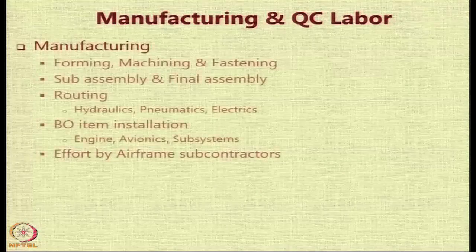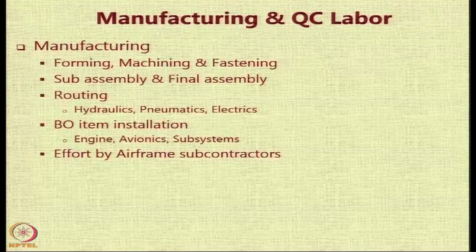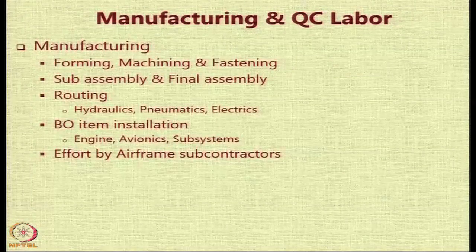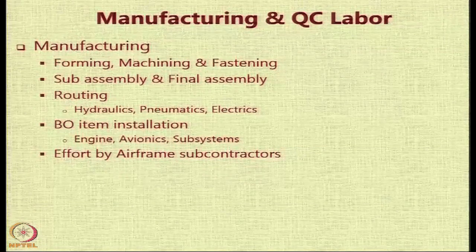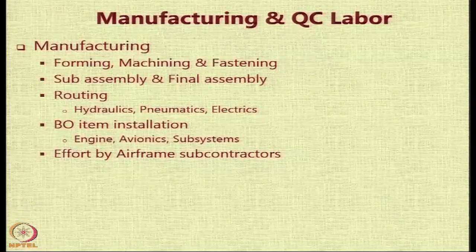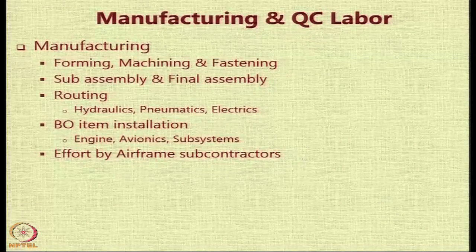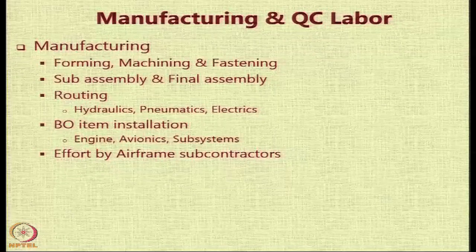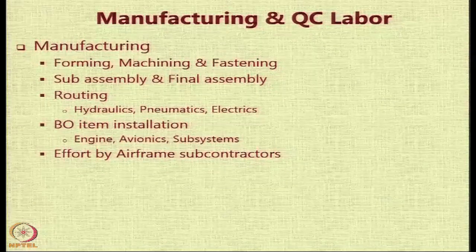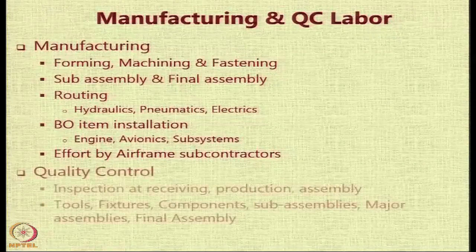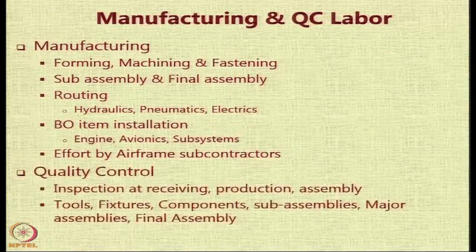The next is manufacturing and quality control labor. Manufacturing involves forming, machining, and fastening. It involves making sub-assemblies and assembling them, routing of hydraulics, pneumatics, and electronics, and installation of purchased items like the engine and avionics subsystems. Airframe subcontractors also work with the engineers of the manufacturing organization — all of them together constitute the manufacturing.